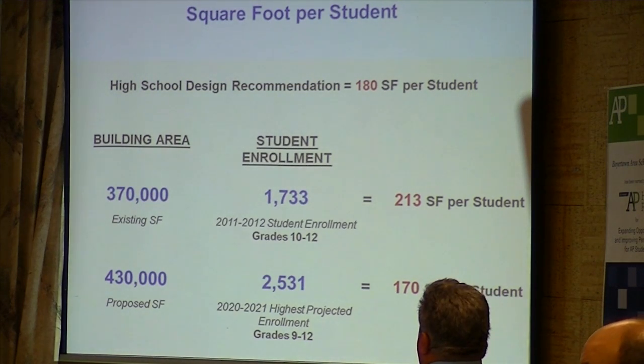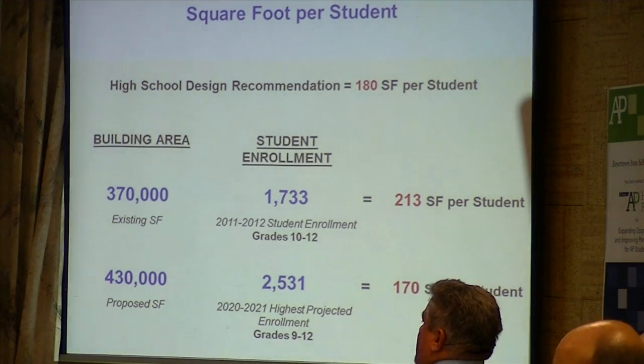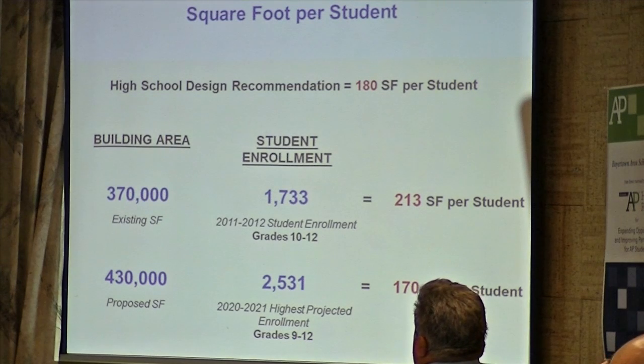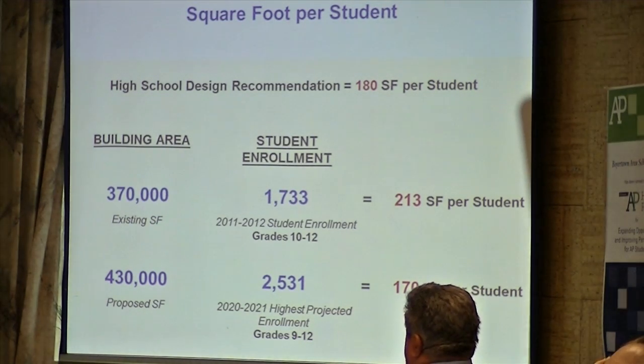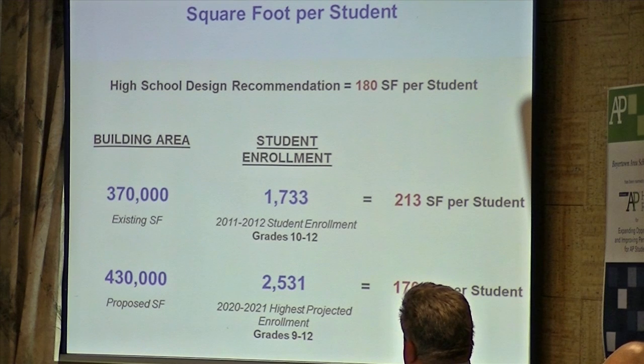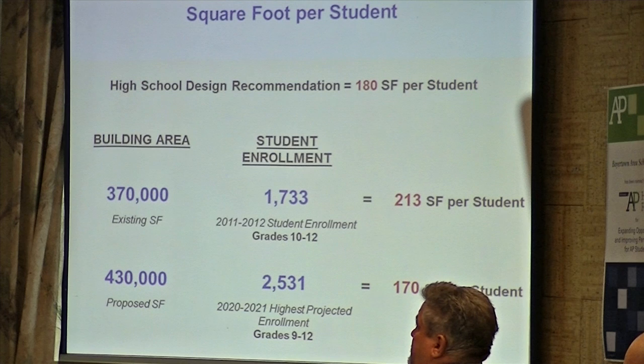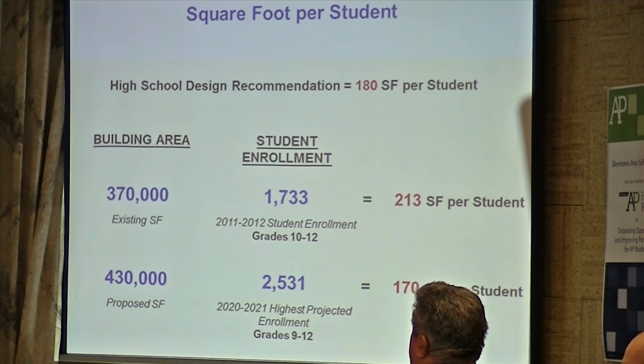But we probably have classes that have more than that. So to get reimbursed for the maximum number of students that we could potentially put in there by 2020, we have to say 25 per classroom, and we have to have enough classrooms for that amount. In the Plancon forms, every classroom that is over 660 square feet gets a capacity of 25. Some people will say 850 square feet is too small for a classroom, but we made the rooms about 850 square feet in this project, which is a standard size classroom.